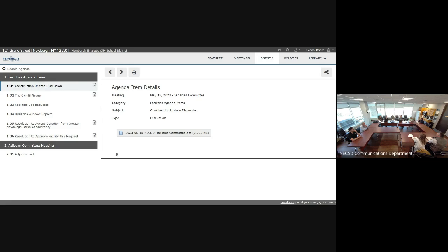So what I know right now is that SED is trending about 14 weeks, and that's how long it will sit before they pick it up for review. So what we have committed to do is request an in-person review, because this is a huge project, hundreds of drawings. So I think it makes sense to sit with them directly and answer their questions. That will at least expedite the review process itself.